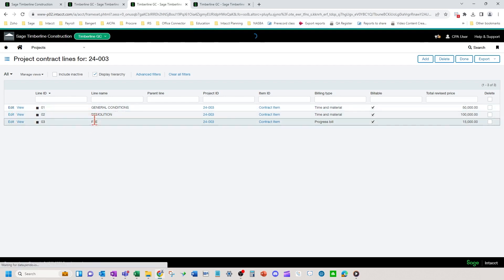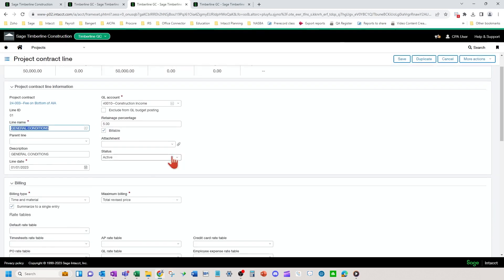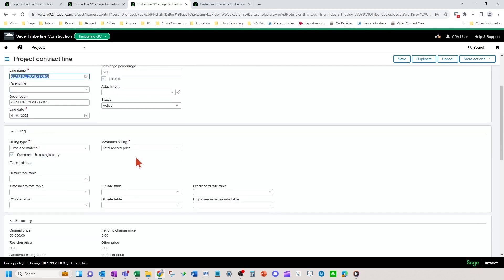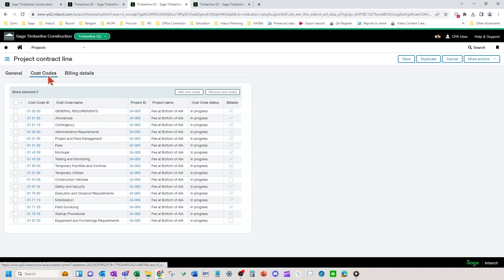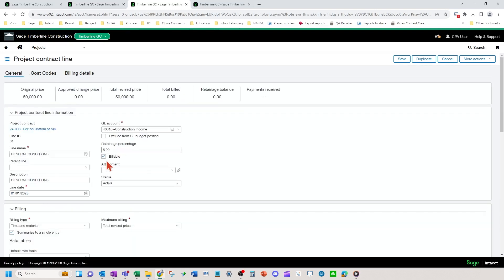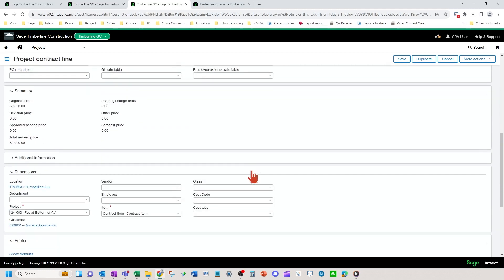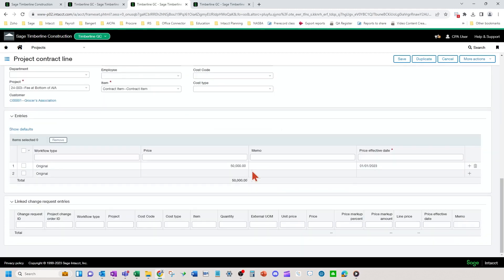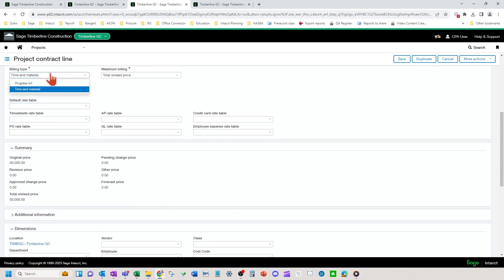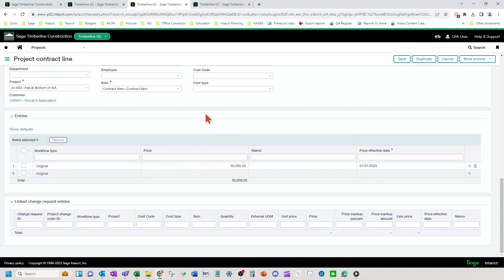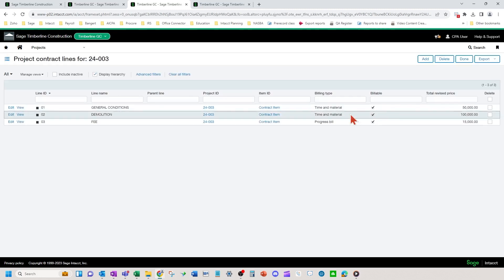We're going to go into here and look at the 01 general conditions is still going to be time and material summarized to get the costs to flow through for all of the costs that would hit these cost codes. Only the costs, no rate table. So same setup as far as time and material needs to be billing type here and summarize as well. Otherwise you take the rate table out and could do everything else the same. So we don't want the fee on the lines. We want the fee at the bottom. That's why we're not doing the rate table.